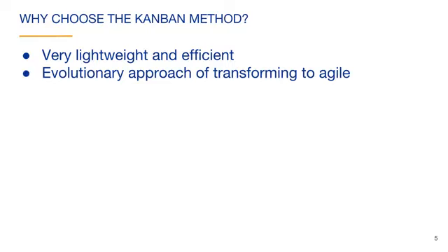The Kanban method can also be used as an evolutionary approach of transforming to Agile. You can use your existing team in their existing roles and begin to use the Kanban method. Kanban doesn't need a reorganization, new types of meetings, or new roles. You can start implementing it now. You can then continuously improve to become more agile over time.